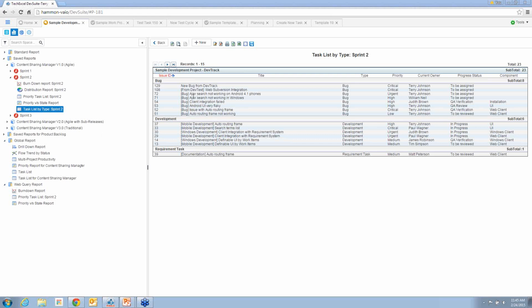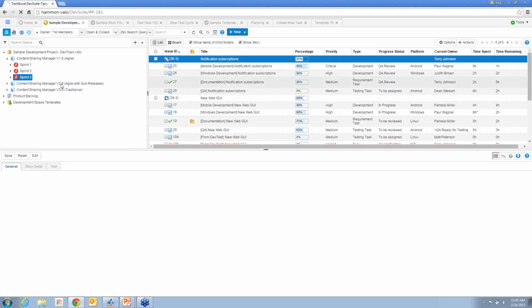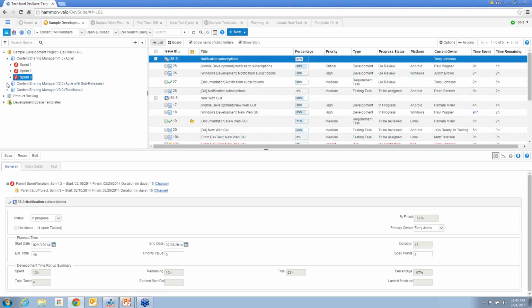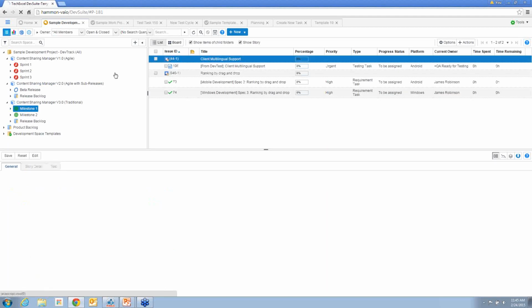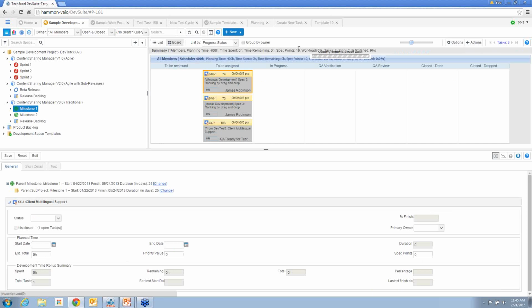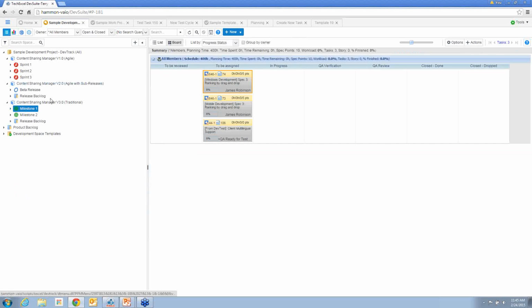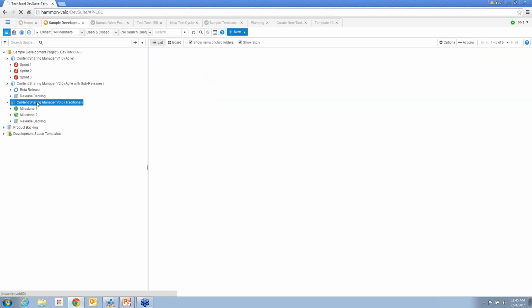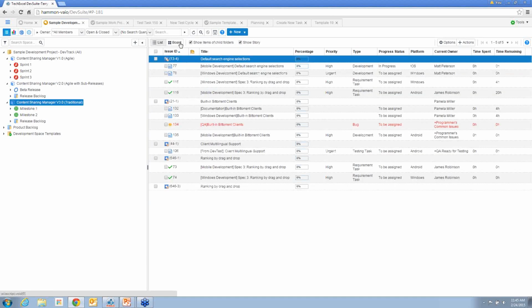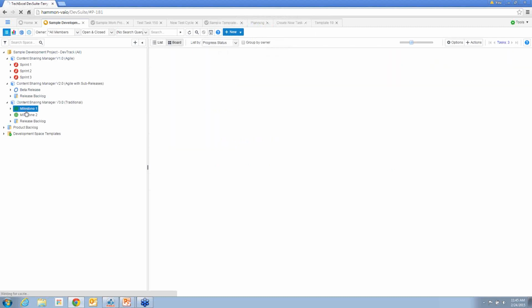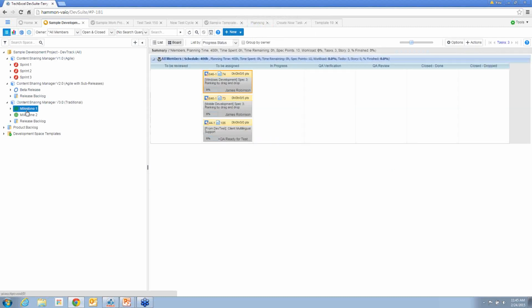Okay, so a question about some storyboard functionality in DevTrack. If you want to see the storyboard and you don't want to have sprints, you do need to have a specific folder type to support that. Another option is the milestone folder type, which will also work with that. That would be an option if you didn't want to use the sprints. But you have to be at least one level below the space to utilize that functionality. It doesn't have to be via sprint.